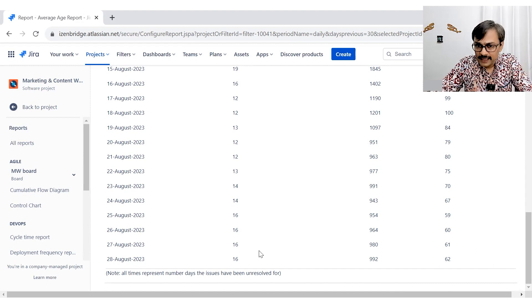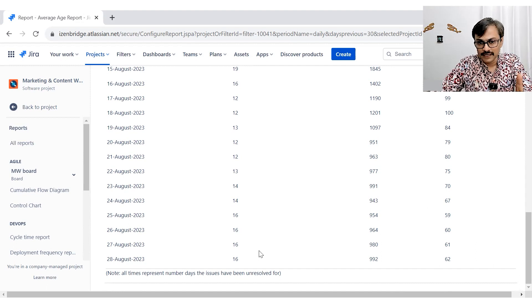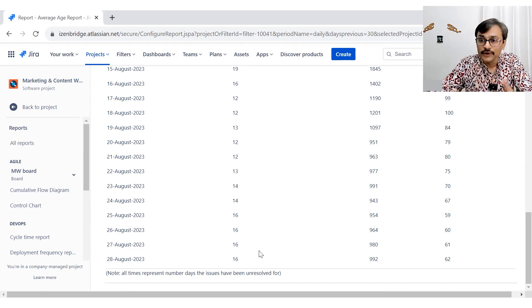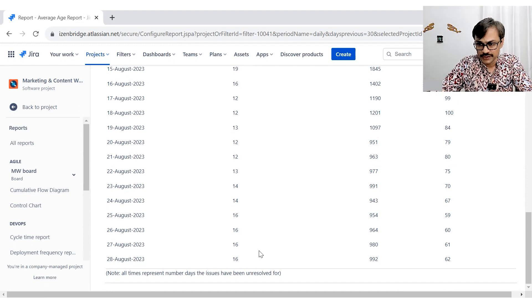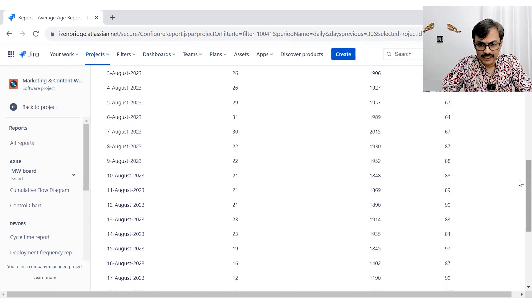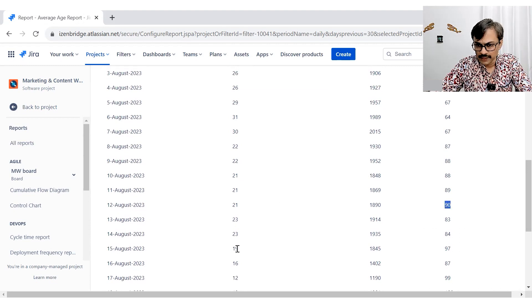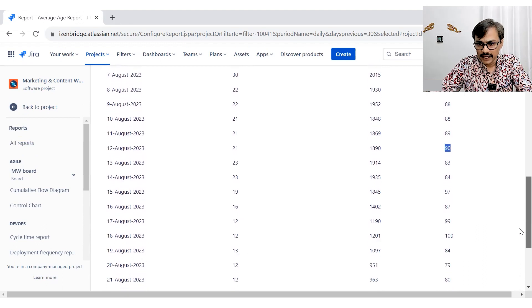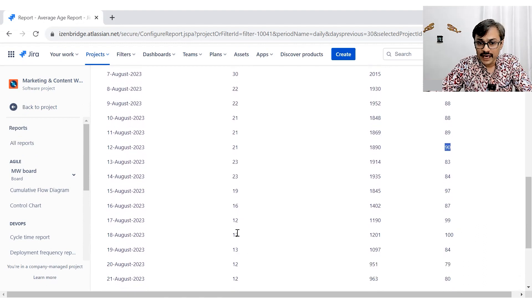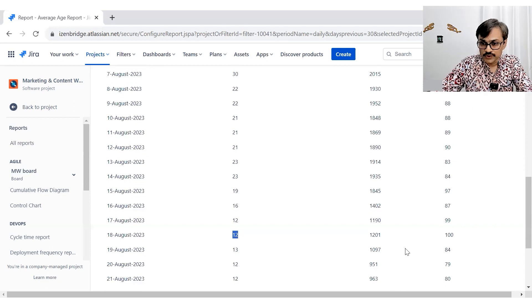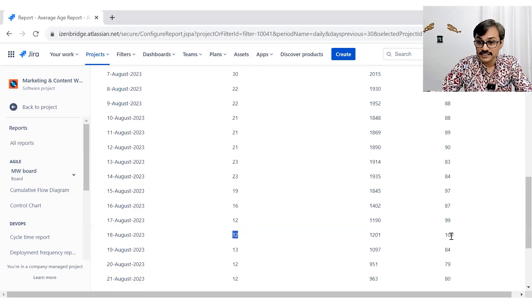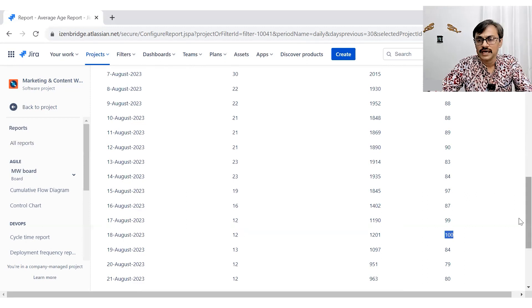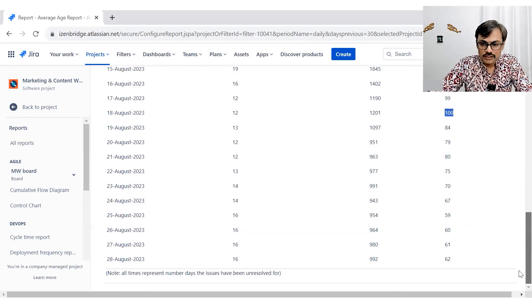So in general, my recommendation is these average age reports can be seen with the help of number of open issues. So you can see that initially our average age was high because we had a lot of issues open and gradually we started closing them. And there was a time where we only had 12 issues open, but all those issues were old issues. That's why the average age became 100. Then we created more issues and the average age started going down.